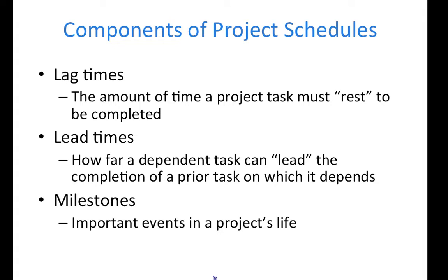And finally, let's talk about milestones. Milestones are important events in a project's life. An important thing to keep in mind about milestones is that they tend to require activities around them like reports, conferences, administration of payments, and the like.